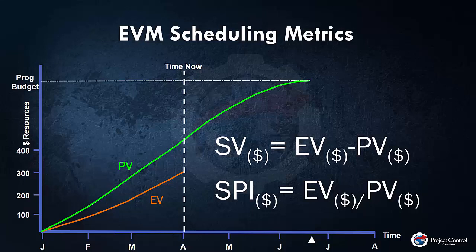Unfortunately, SPI and schedule variance are very often misinterpreted as a time-based indicator — for example, are we early or late and by how much? But in reality, SPI and schedule variance are not time-based indicators; rather they are an indication of the physical status of how much of the work has been accomplished as compared to the planned work. That's one of the reasons why EVM scheduling metrics are not used to estimate the project completion date, because the units are in measure of currency, not time.